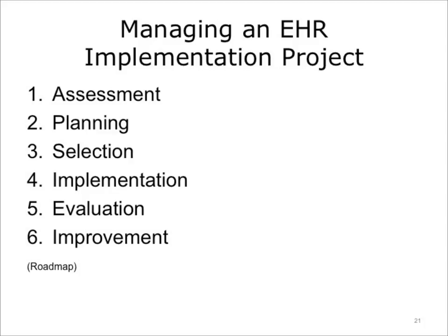with timelines. The implementation plan includes details on installing and configuring hardware and EHR software. A plan for migrating any old data over to the new system must also be devised, including any necessary database conversions in a manner that ensures data integrity. A staff training program is initiated and system testing follows. Then, the staff begin to use the EHR system. Throughout the process, a journal of experience and processes is maintained.